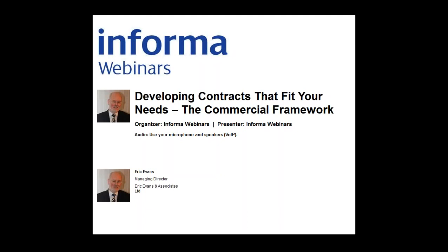If a supplier says he will use reasonable endeavours, that means he will do whatever he would do for any of his customers, whatever he would do in normal circumstances to try to fix the problem. But he will not go out of his way to fix the problem. If a supplier agrees to best endeavours, then he will fix the problem whatever it takes.